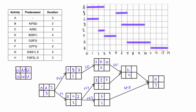For activity F, it's a finish-to-finish relationship with a lag of three, so F can finish three days after C finishes. Two plus three is five for the early finish, and subtracting the duration gives us three for the early start. Coming into the earliest start for G, we can either have start-start plus one from D - which is six plus one equals seven - or we can have three from the regular finish-to-start off E. We have to pick the largest value, so we take seven, which satisfies both the D and E logic.